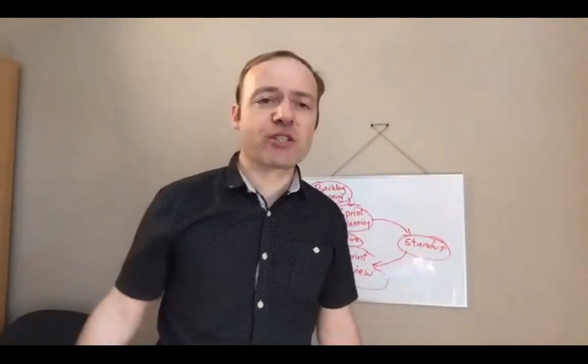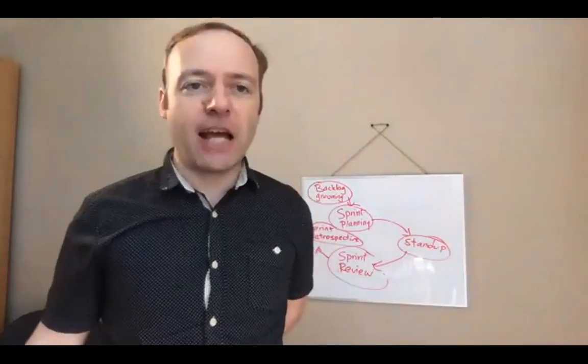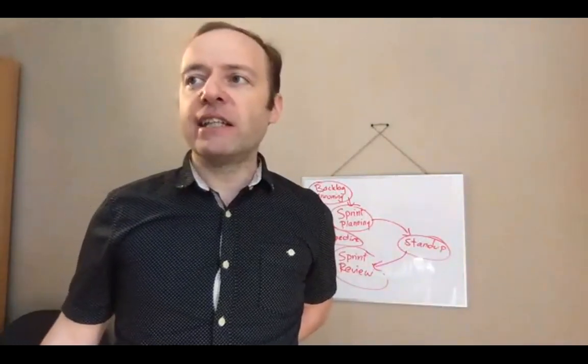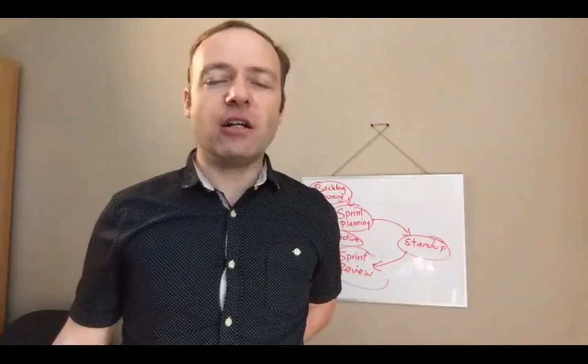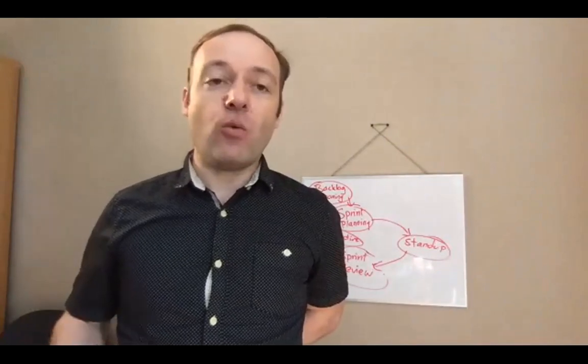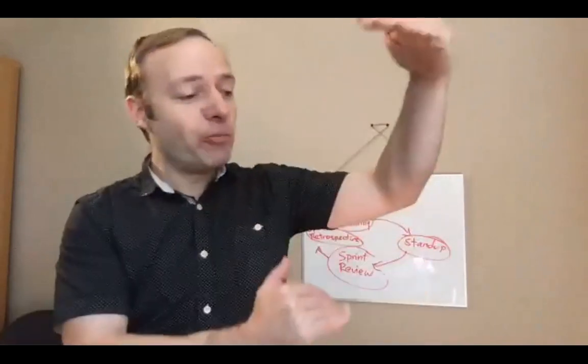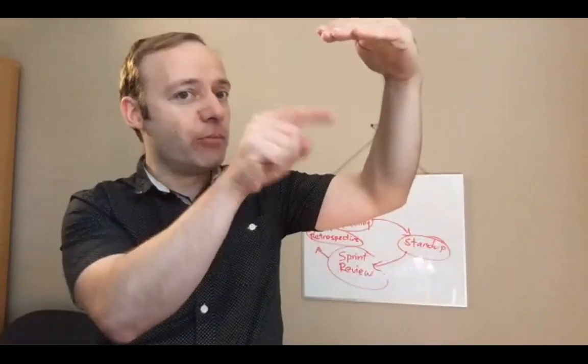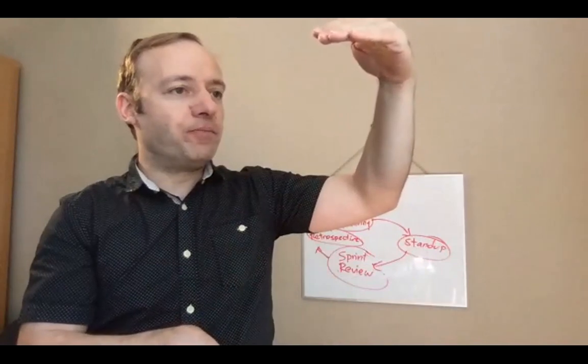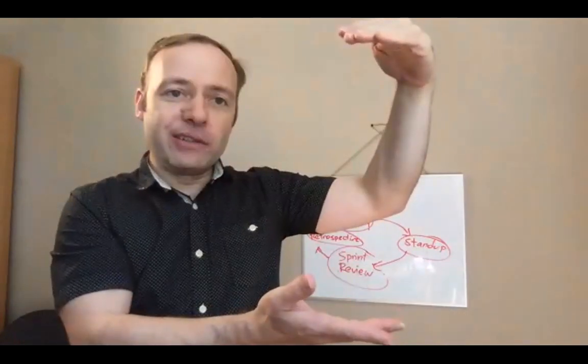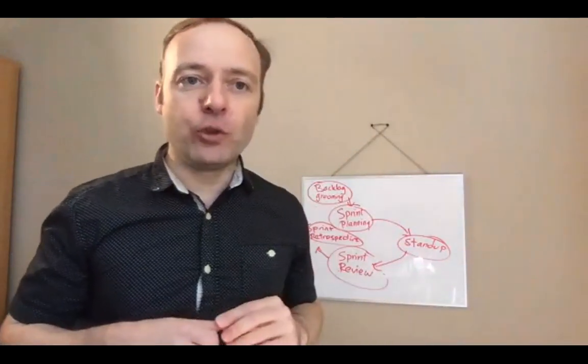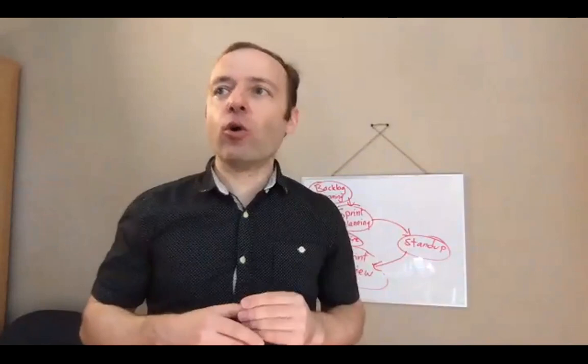The benefit of using Scrum, even though it's more complex than Kanban, is that it can give your stakeholders a good idea of when it is going to be ready, because you have this roadmap full of items that are story pointed, and you want to know when you will get done. Then you can check your sprint velocity for your team as a whole, and you can know, oh, well, we do on average 40 points per month, so we think that we can do this much during the next sprint.